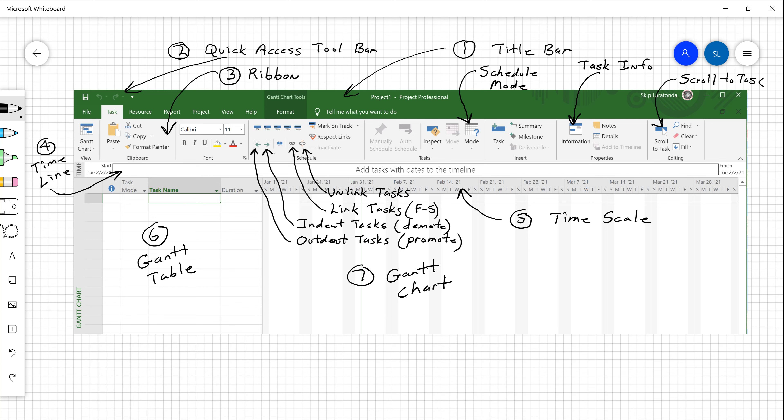Notice there's a time scale that runs horizontally across the screen, and a timeline that also runs across the screen — we won't use the timeline that often, but we will use the time scale a lot. The Gantt chart in Microsoft Project is really comprised of a Gantt table and a Gantt chart. The Gantt table has an indicator column, the task name, duration, and other columns you can modify, with common ones being task name, duration, scheduled start, scheduled finish, and predecessor information.